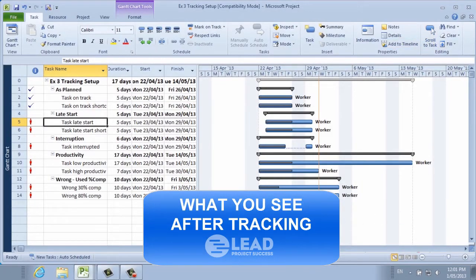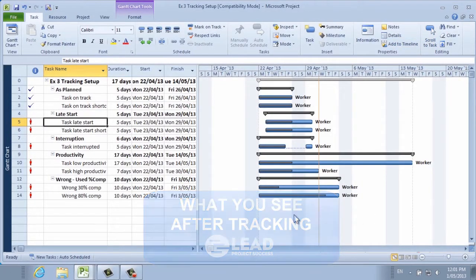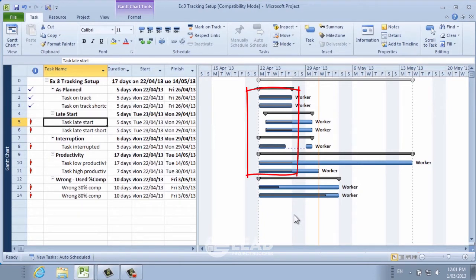So once you see the Gantt chart with some progress recorded, you'll see that there are black lines inside the bars. That's the progress. You'll see that this is where we had a task that was interrupted and we essentially split the task, pushed the remaining or moved the remaining work into the future. And you can see this down the bottom here, these last two. This is where the progress is tracked incorrectly. So you want to look for that sort of stuff and make sure you don't have it in your Gantts.